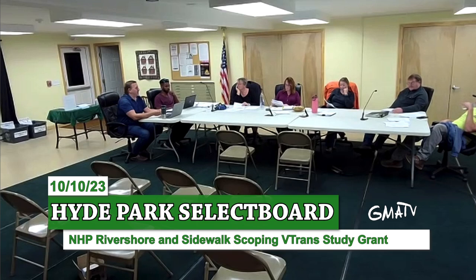So when Mark says, you know, I don't have 3 weeks for that sidewalk project on Ferry Street in my plan next year, maybe next year, but then things change and a flood comes or whatever. So his response lately has been, here's my list of things I can do for maintenance and keeping the town rolling on the annual highway maintenance plan. Those other things have to be put off into contractor world, like the Garfield FEMA project with the Collins Pond. That's too deep for even our new excavator. Right. And it's going to take a month or 6 weeks or 8 weeks to do.